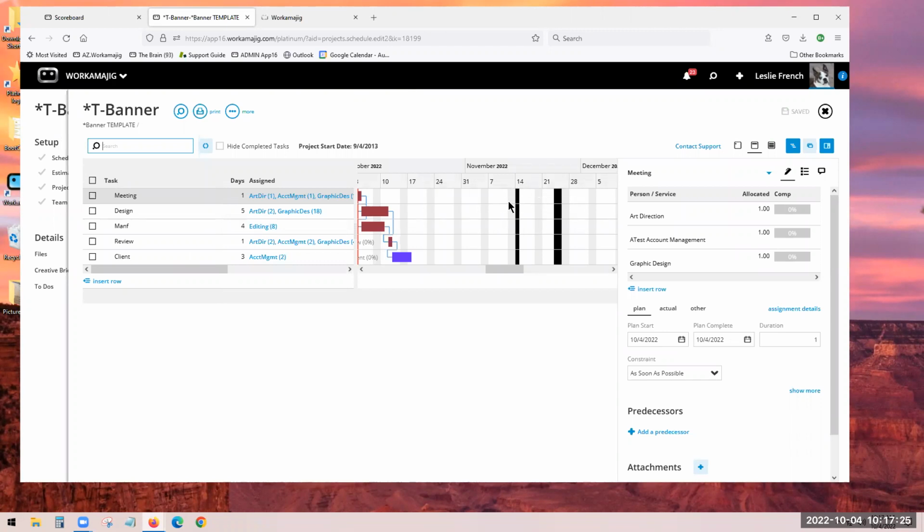Hopefully you will start to see yours popping up in your calendar, in your Gantt view, in your staff schedule, and that comes from our calendar settings. I can go over how that's set later. But right now, if you don't see those black bars, the system would assume you're working on the 14th. I think that's Labor or Veterans Day, and then we've got Thanksgiving coming up here in the States, right? So those would block out your working days, just like the weekends are blocked out.